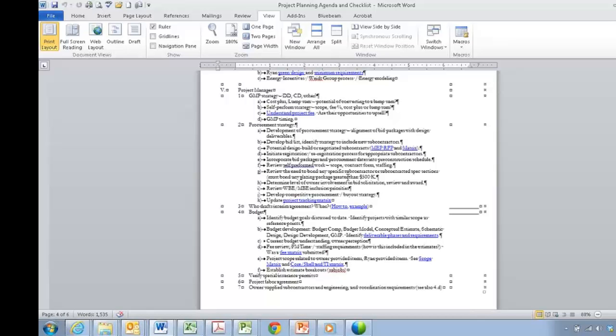And really our procurement strategy needs to make sure it also involves the field at this point. And I think it's very important to note that while we alluded to the overall project schedule before, it's important to be developing that overall construction schedule so we confirm with our field team exactly how we want the building built, and that can then play into that procurement strategy if we're doing phased design deliverables to that end.